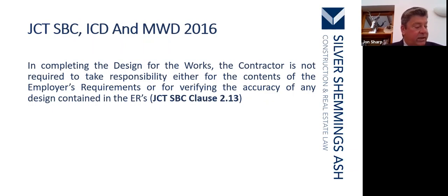In completing the design for works, the contractor is not required to take responsibility either for the contents of the employer's requirements or for verifying the accuracy of any design contained in the employer's requirements. JCT SBC clause 2.13. That's important for everyone to know.